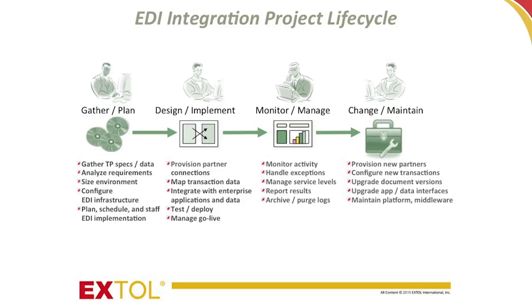a new project and what type of customer are we going to want to start with for the most bang for our buck with the reusability aspect of the project, you don't want to take your one-off, your mom-and-pop type customer, your mom-and-pop type trading partner. You want to make sure that you're using something that is, as much as you can, all-encompassing of the business aspect that you're dealing with. So you would want to have a more difficult trading partner up front. You want to make sure that that's the case, because what that allows you to do is most of that work is done up front, and you're already putting in the time to develop that.